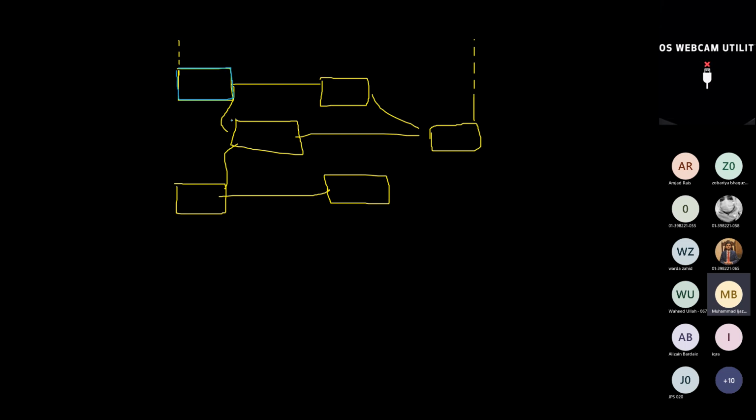Let's say this activity is 10 days, this one is 8 days, and this one is 5 days or 5 weeks or whatever. If I distribute this over time, so this is January, this is Feb, what is this? This is a time-phased network diagram, isn't it? Right? So even this can be used as a schedule baseline.